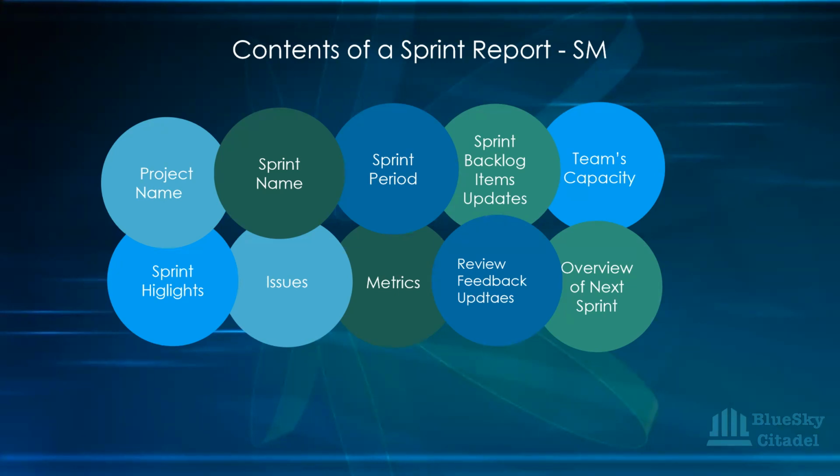Like I said, you're describing and then you're giving reports on them. The status for it, is it completed? Are any of them not completed? And then you put a reason for the non-completion one. You can just use another column to do comments, and they're able to put the comments there. Where were they not completed? You're able to put them there. And remember your list is the number of stories that you've taken into the sprints, which definitely is the requirement, what they've requested for, that is what you're listing for them.